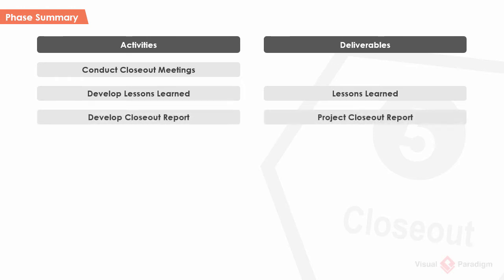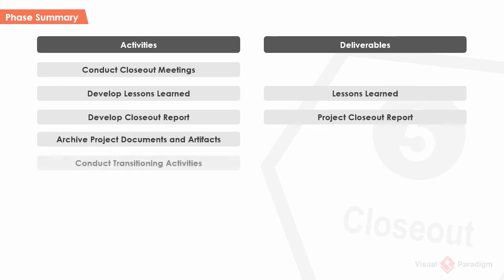A closeout report is developed to document the variances from the baseline plan. It is important to ensure that all project documents are properly stored for future access. This phase ends by having the deliverables transferred to the operation staff, marking the end of the project in the IT project management lifecycle. The project team will then disperse.